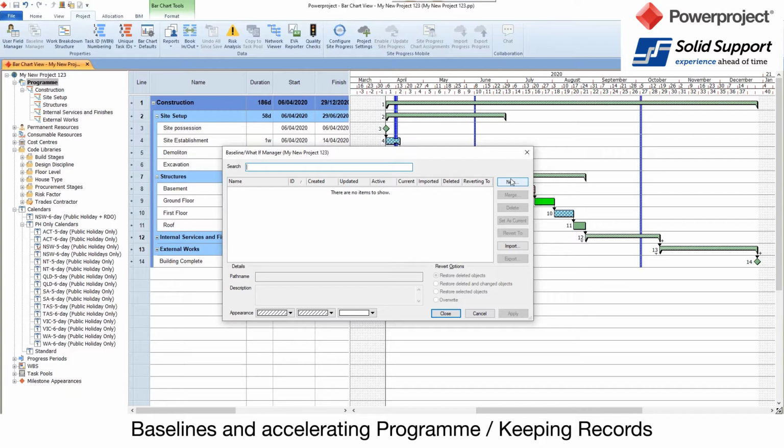Now, the advantage with that is if there's no limitations with the baselines you can have, you can actually have your original contract, but then as change orders come in, you can put those in, but you can also have weekly baselines. And at any time you can display those back in there. And that will allow you to see how you're doing now compared to week 4 or month 3, whatever you wanted to. So I'm just going to create a baseline.